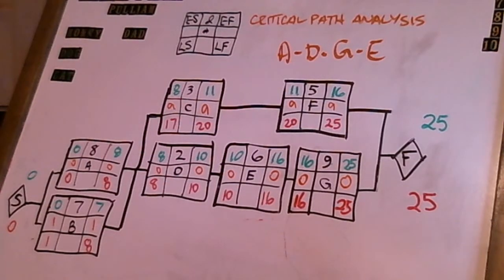One of those activities is activity B, and when you calculate float, you're taking the late finish and subtracting from that late finish day the early finish day. Now, in my particular example here on this network, I've got the unit of measure being days. So if we were to take activity B, for instance, and look at the late finish date, that would be day 8.